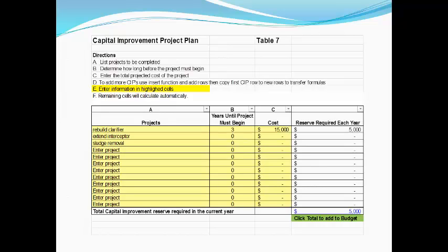Those projects you can also identify in the project plan, but those projects will probably result in undertaking some sort of financial advisor to help track when the best time to implement those projects might be. When we are looking at the asset management plan, we are not going to be looking at those large-scale projects that are going to be requiring outside financing. The projects that we will want to see addressed in the asset management plan are those smaller kinds of projects that the municipality or applicant will address internally.